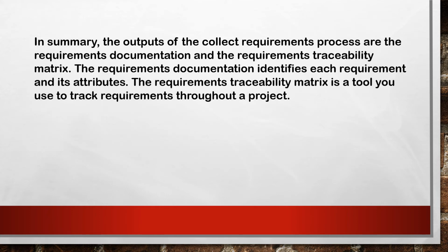In summary, the outputs of collect requirements are the requirements documentation and the requirements traceability matrix. The requirements documentation identifies each requirement and its attributes. The requirements traceability matrix is a tool used to track requirements throughout the project.